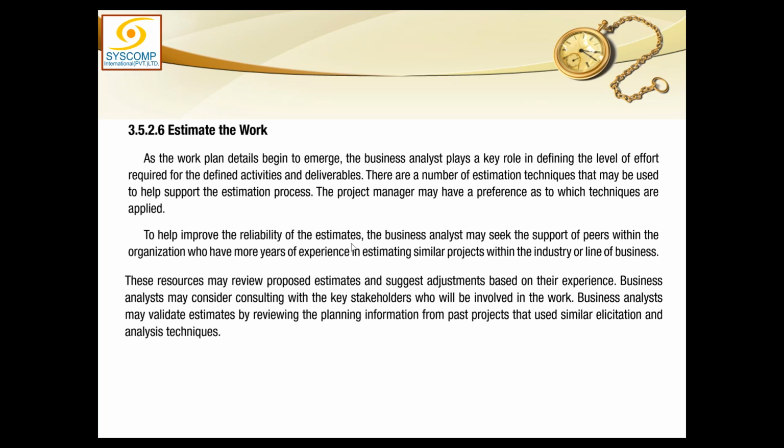To help improve the reliability of the estimates, the business analyst may seek the support of peers within the organization who have more years of experience in estimating similar projects within the industry or line of business. These resources may review proposed estimates and suggest adjustments based on their experience. Business analysts may consider consulting with a key stakeholder who will be involved in the work.